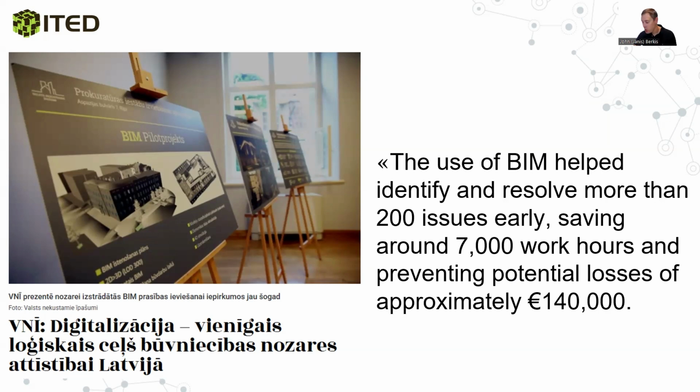In this case, it was a pilot project and it utilized the second strategy. So the design was completed and the client decided, let's model the 2D design into 3D and have a look at what we find. The investment was around 40,000 euros.